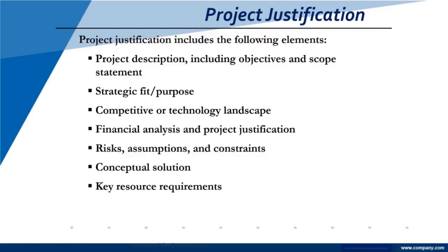Are there any key resource requirements? You might put that in your justification. I need resources. Remember, resources can be people or they can be things. So if my project has to have a supercomputer, then I need to have that as a key requirement, if that's what you have ascertained through your research.